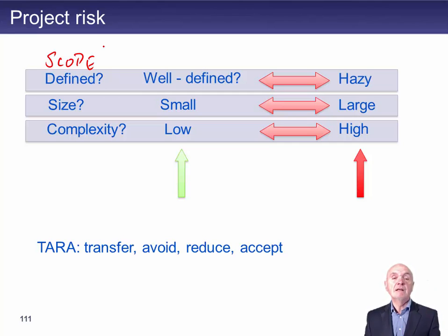We want to reduce that from 20% down to 5%, and we want to reduce the overall value of inventory that's held on average by 25%. Then you are very carefully defining what's happening. Nobody's under any illusions.